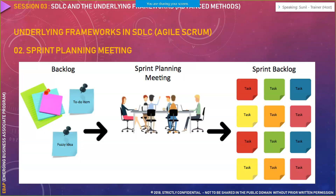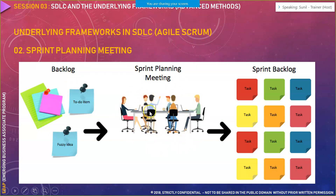Rules for conducting a stand-up meeting: the meeting must happen in the same place and at the same time, be a maximum of 15 minutes, be facilitated by the scrum master, the entire team should be present, and only three questions are asked to each participant. For sprint planning: after every 15 days — or whatever the sprint cycle — you go to the product backlog, pick up the prioritized items, discuss them in the sprint planning meeting, and create the sprint backlog based on the team's capacity or bandwidth. This process is repetitive at the frequency of the decided sprint cycle.